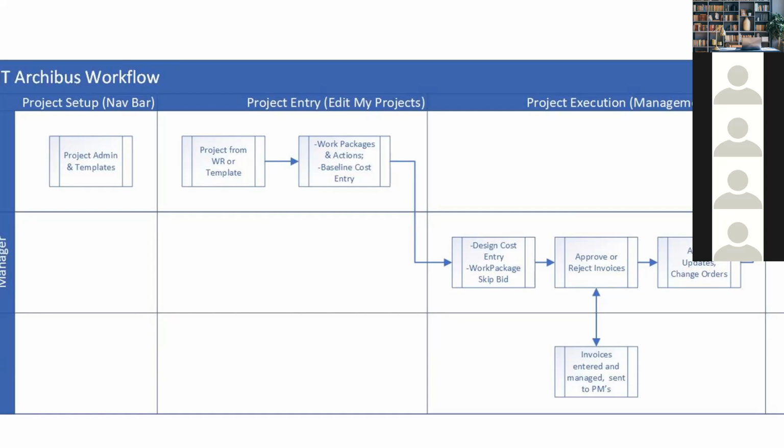One, you have a project, top level. That project is made up of one or many work packages, what Sean articulated and delineated in his presentation. Those work packages are discrete pieces of work package information that are put together. And those work packages can have one or many actions in them. Actions, just a synonym for tasks. So you have a project, which is made up of one or many work packages, and each work package can contain one or many actions, which is another word for a task.